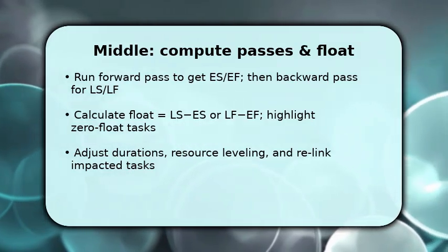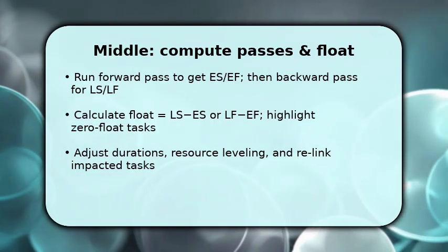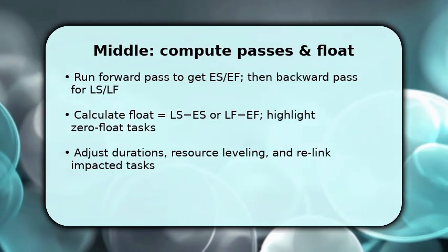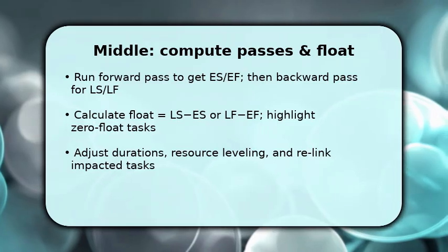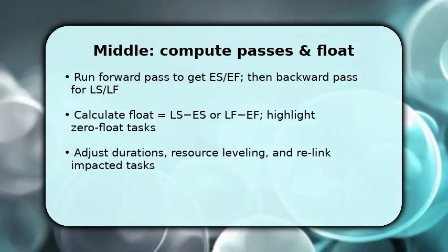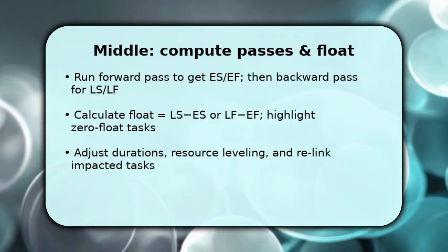Make sure to examine resource conflicts and apply leveling only after understanding float impacts. If adjustments change predecessors or durations, rerun both passes immediately. This maintains consistency and reveals shifting critical paths as you optimize allocations and compress or extend tasks.